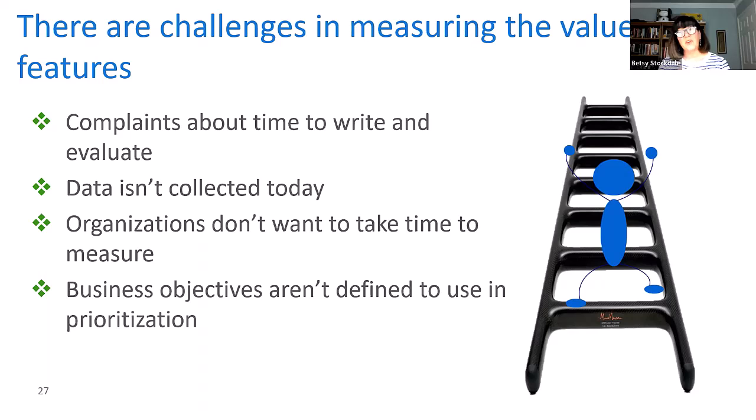For us to have a really good first draft, it's about a 2-week effort, not full time, right? I mean, we're doing other things, but it's to hold a meeting, to draft the model, take the information we've gotten, transform it, put it into the model that we showed you, to review it, to have it again, right? And it's kind of that iterative process.